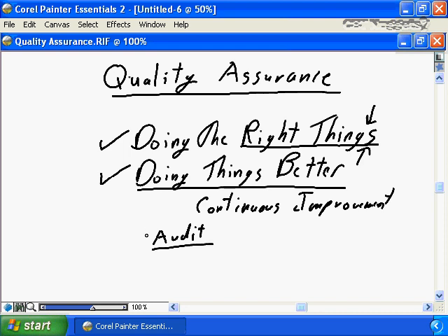We do the audit, and we ensure that the steps defined are being followed. Again, I know I repeat myself, we defined walkthroughs are to happen, and we defined walkthroughs need to have 6 people. The audit reviews that, ensures that is taking place, and then with our continuous improvement process, we make improvements by reducing the number of participants down to 4, or whatever the appropriate number will be.